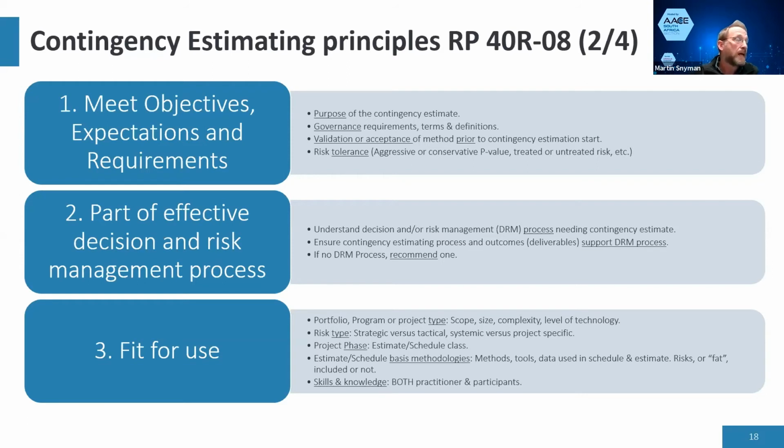And the methods that you use must fit the skills and knowledge of the practitioners and the participants in the process. So no good having a QRA and the other people don't understand it, or you have a project to maybe refurbish a whole truck for a mine, and you put a young engineer on the job who's got 1 year's working experience. He's facilitating the session. He's going to do the calculation, and you've got the accountant on the team and the civil engineer on the team and the tea lady. That's not going to get a good result.